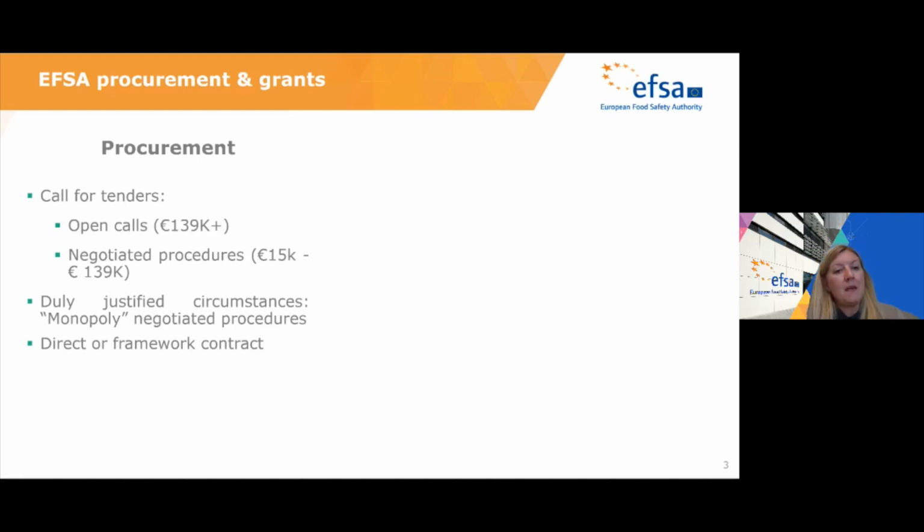In some exceptional circumstances, we can also launch what we call monopoly negotiated procedures. These are very exceptional because by their nature, we're only inviting one organisation which has a monopoly on the provision of that service. They're less transparent because they're not advertised on the website and they're not subject to prior publication in advance of contract notices.